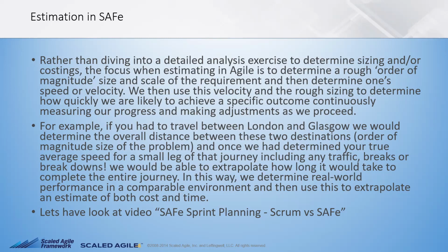So here, every sprint, how many user stories, how many requirements we completed, that's what we normally refer to as velocity. So if you are executing 3-4 agile Scrum executions together, you might want to compare the velocity among themselves as well. And then, to help better, we might help the team which is lagging behind, might be due to requirement creeping, might be due to a scrum master leadership challenge or something like that.